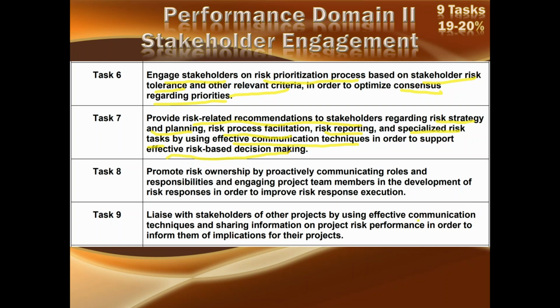Task number 8, promote risk ownership. There must be an owner for every risk. It is not the project manager who owns all the risks. Or you cannot dump it on the stakeholder that you are the risk owner. No. Risk ownership must be allocated specifically for each and every risk by proactively communicating roles. You must tell that this is your responsibility. You are the owner of this risk, and the person who is owner of the risk must explicitly know it. Know about his roles, his responsibilities, and engaging project team members who will be working with him on that risk.